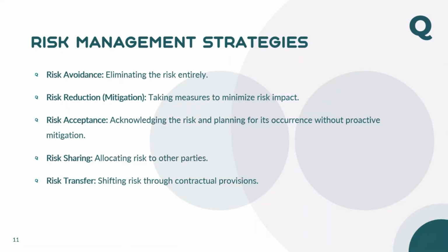Then risk reduction. At least you should reduce the impact of the risk. To reduce the impact of the risk, you can ask for a 50% advance payment instead of 10%. Or else you can resequence your work to show some progress in the first month and get some money. Or you can resequence your purchasing so that you get the material.